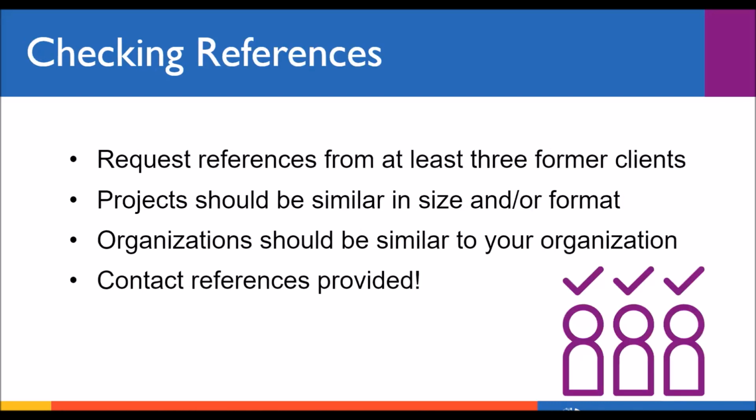Okay. Finally, any vendor that you're considering working with should be able to supply you with the contact information for at least 3 former clients. Now, you're going to want to ask for references for projects that are of similar size as your project and digitizing similar materials. Now, preferably, these references are going to be from a similar organizational size and type as your own. It might not be, but you're going to want to get as close as possible from the vendor, because